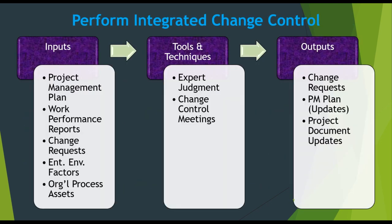Perform integrated change control — inputs are: project management plan, work performance report, change requests, enterprise environmental factors, organizational process assets. Tools and techniques are expert judgment and change control meetings. Outputs are change requests, project management plan updates, and project document updates.